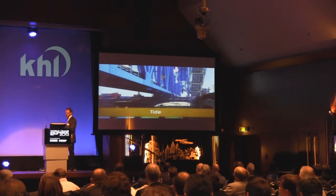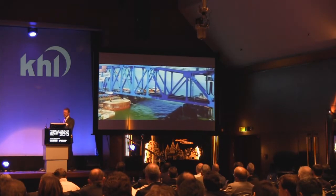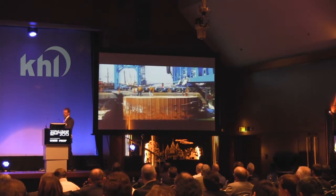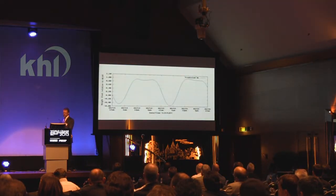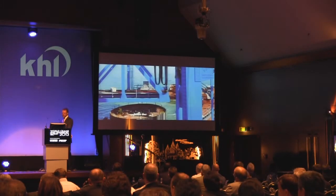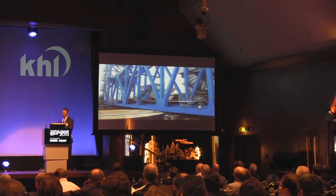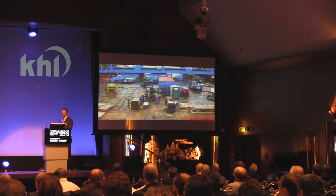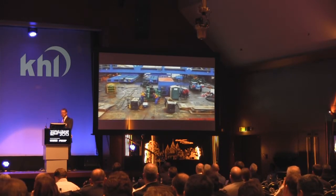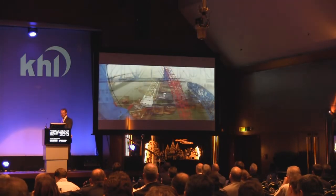When considering vertical clearances in the intercoastal waterway, a fundamental element to be aware of is the tide level. Burkhalter had to constantly monitor the tide and engineer their rigging process using the tidal charts. The tide directly affected the vertical clearances of existing dolphins and the railway, as well as the barge ballasting requirements to set the new lift span bridge and to lift the existing bascule bridge. Once the new bridge was in place and the process of removing the old bridge began, the tide played a huge factor in the ability to pass underneath the new lift span bridge.